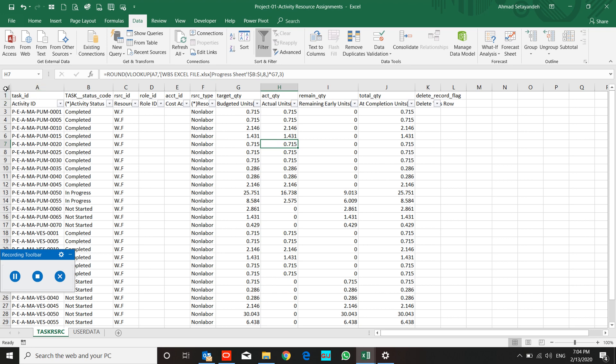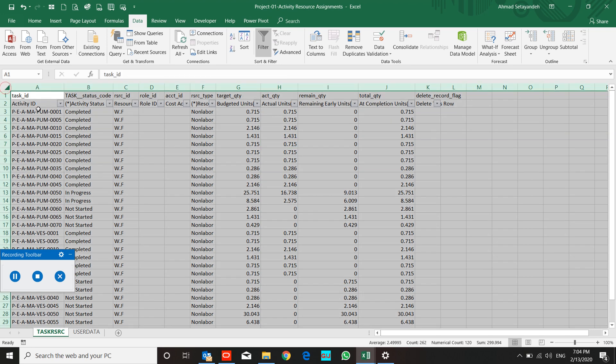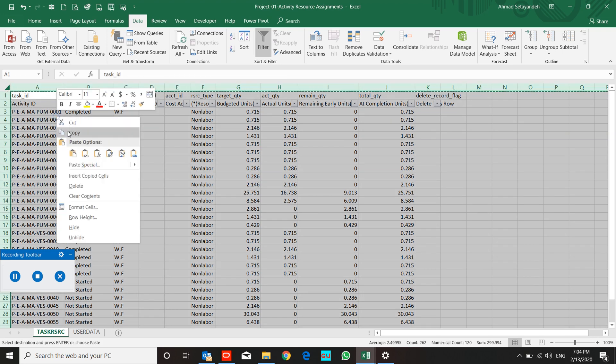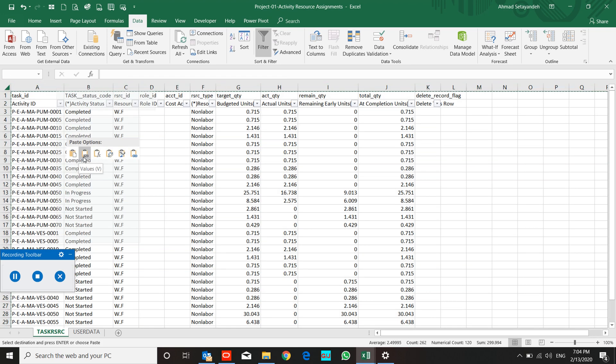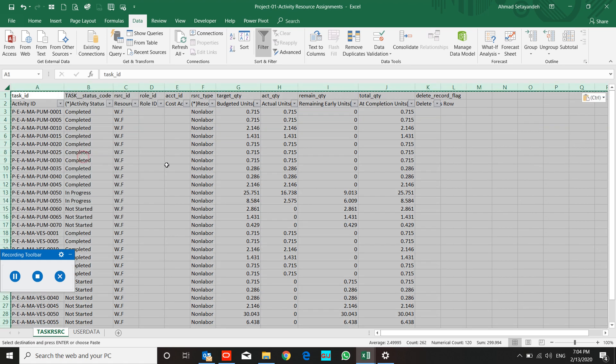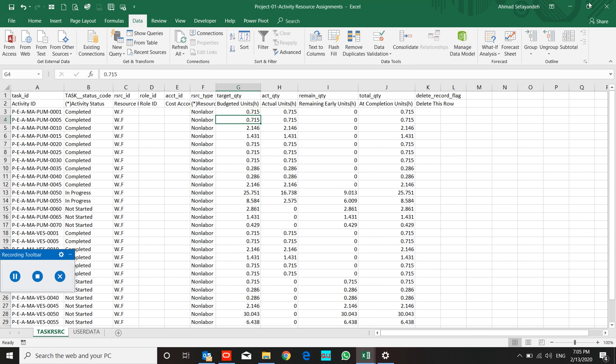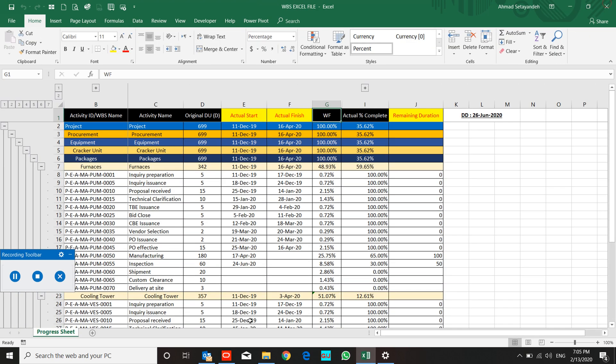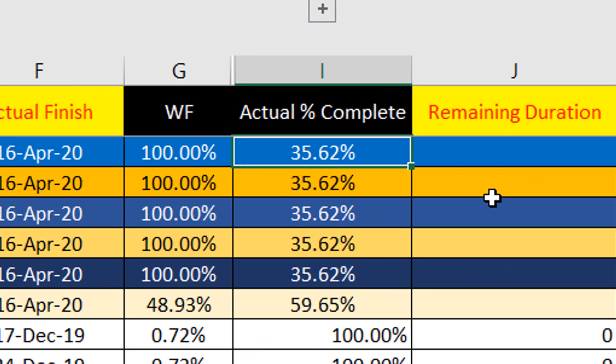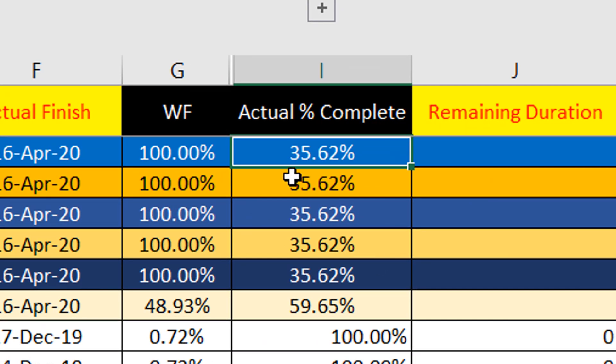Progress sheet—I change all of them to the value, remove the filter, save the file. Actual percent complete in this progress sheet equals 35.62.